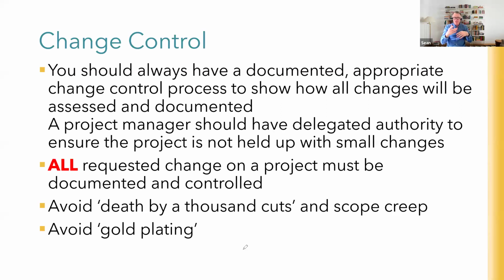Gold plating is just sort of the inverse of that. It's you deciding that you can add extra functionality to a client's deliverable, and you do it without asking them. You gold plate the deliverable, and then you find out that they didn't want it that way anyway. And I've seen that with a software project that was upgraded because new technology became available, handed over to the client, and the client said, well, if you'd asked us, we would have told you that our hardware can't support that functionality. The point here is always talk, always be open, always get agreement, and always document all of your changes.